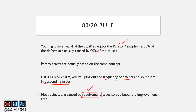So requirements gathering should be improved. If we want our next project to have fewer issues, we should immediately work on improving the requirements gathering phase to minimize issues caused there. That's how the 80-20 rule works — roughly 80% of the issues were caused by 20% of the causes, which was the requirements gathering phase, and the Pareto chart signifies exactly where to focus.